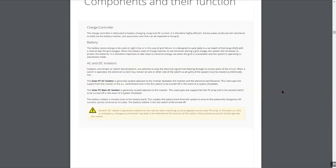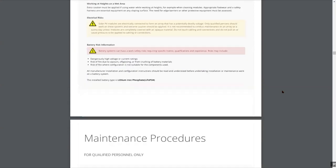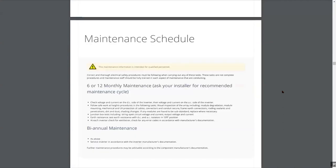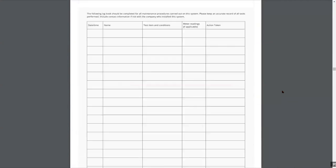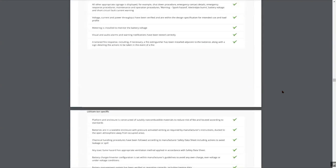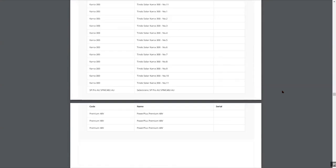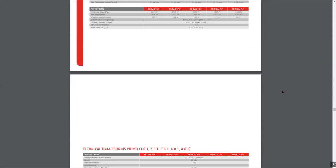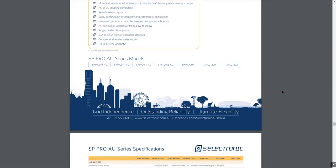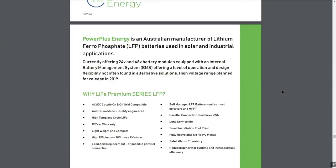This document is generated according to the type of system you have designed. If it's just solar and a grid inverter, it will only apply to that. If it's an off-grid battery system, there'll be information about generator maintenance and how an off-grid system works. There's a maintenance schedule, the commissioning report, the data sheets of the main components, and you can add further documents at the back. The line diagram is in there as well — it includes everything.